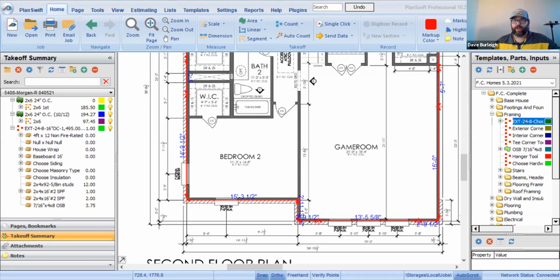The biggest part of this really comes down to the field itself. We can help you derive extremely accurate estimates, extremely accurate bill of materials, extremely accurate details, but then we need to rely on the field to actually enforce those. They need to make sure that the home is being framed the way that you asked for the home to be framed, and make sure that the openings are being framed the way that you asked to frame those openings. If we deviate from that at all, then we're already back to the bill of materials didn't matter because we allowed the framer to operate outside of the plan that was designed and ordered specifically based on that design.